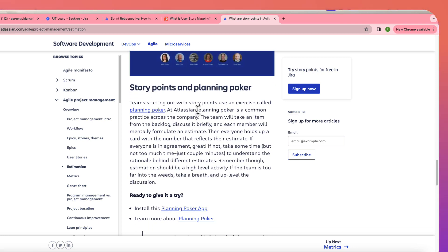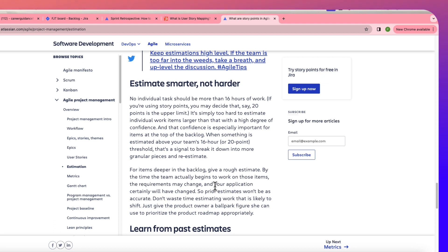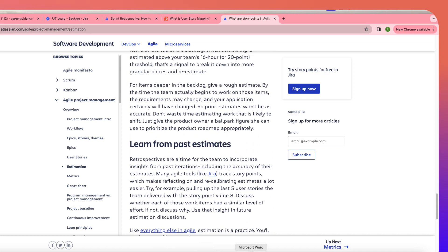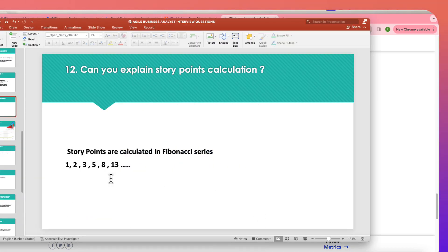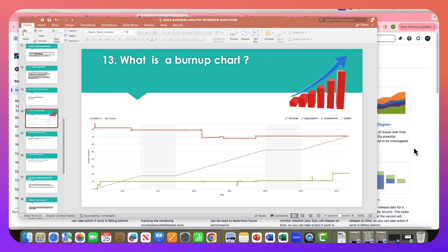It takes time to learn to judge story points correctly. As you gain experience you give more accurate estimates. It's always advisable to give a slightly higher point estimate because you never know how long coordination will take. That is story points calculation.